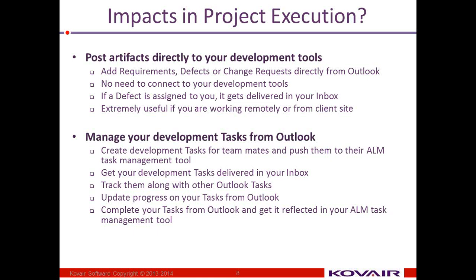Also, we should be able to update our progress directly from the Outlook task, and this updating of progress, say I've done it 50%, it should get automatically reflected in my project management tool or from where I'm maintaining the schedule or task, say for example MS Project, Microsoft Project. So if you mark a task as completed inside your Outlook, then it should get reflected in your MS Project or other project management tool that this job has got completed.